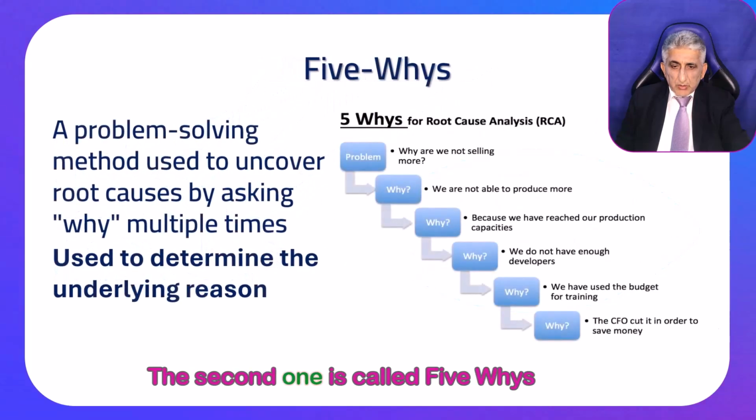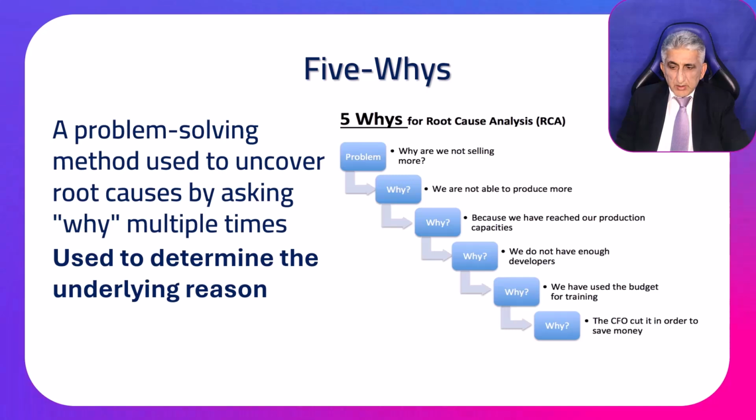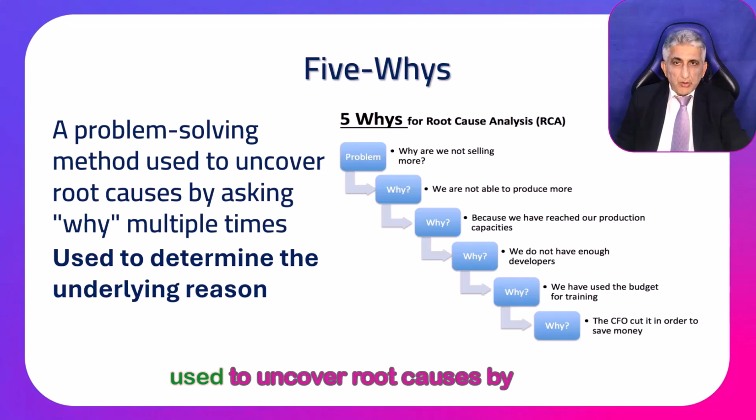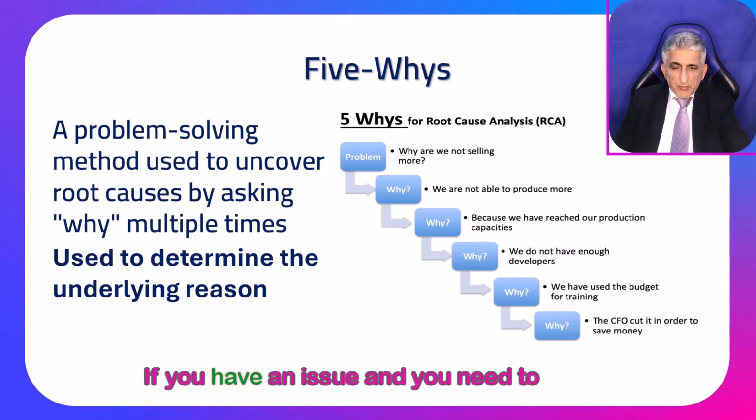The second one is called 5 whys, which is a problem-solving method used to uncover root causes by using why multiple times. It's also used to determine the underlying reasons. If you have an issue and you need to find the root cause, you ask 5 consecutive questions.